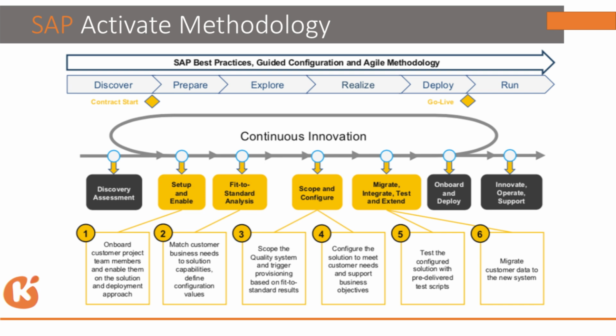And the sprint plan. So how we can do that phase by phase, iteration-wise: in the first iteration what we can take, in the second iteration what we can take, in the third what we can take, and what should be the priority initially. Those things will be defined in the explore phase. It is just only to explore that.